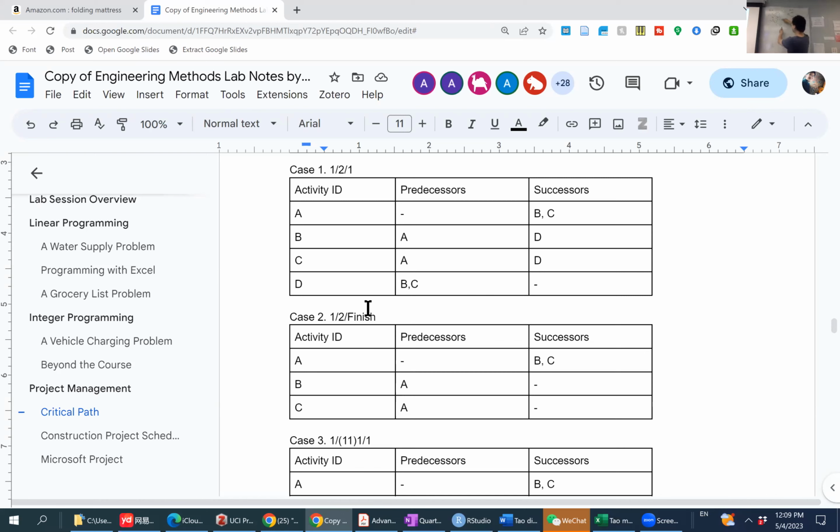Now we need to find out what to do with the next part. At this point, we have both nodes after B and C, but we need one and only one starting point and one and only one finishing point. So in this case, we do need to create a fake finishing point. Well, in this case, we should identify each of these nodes as the finishing point. So if I identify this one as the finishing point, then I would point the bottom node to the upper node.